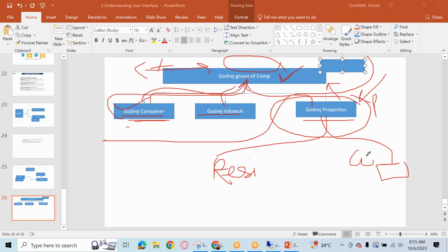This depends on reportings and the extended functionalities. For example, let's say financial planning. When Godrej Properties is your portfolio definition, whenever you are going to invest in the market, it is based on residential or commercial. Another way, being higher management in Godrej Properties, you may want to understand your investment based on locations. For example, in North India this is my investment, in South India this is my investment, and you manage all your financial and capacity planning based on the location. In that case, you can go with a location-wise bucket.